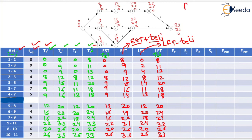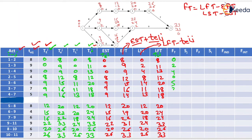Now we find the total float, which equals either LFT minus EFT or LST minus EST — both give the same answer. The total float values are: 0, 2, 4, 0, 5, 2, 4, 0, 5, 2, 2, 0, and 0.